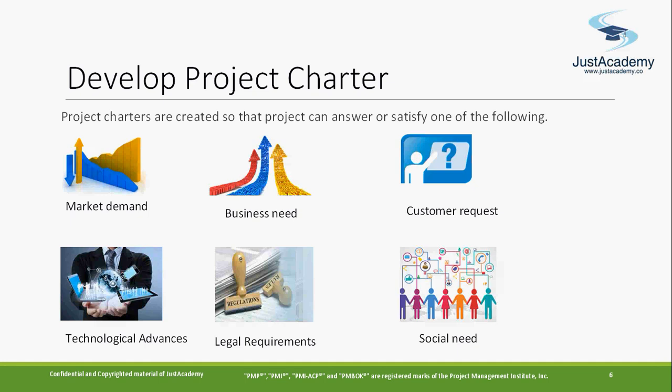Technological advances: when you're trying to upgrade any hardware and software, a new project can come into the picture, and again you need to work on a project charter. Legal requirements, aligning with government regulations, like GST coming in India, or US visa rules, you need to align with all those whenever legal requirements are there. And social need: whenever any social need is there, a new project can come into the picture, and at that time you go and create a project charter. So that's on a high level.